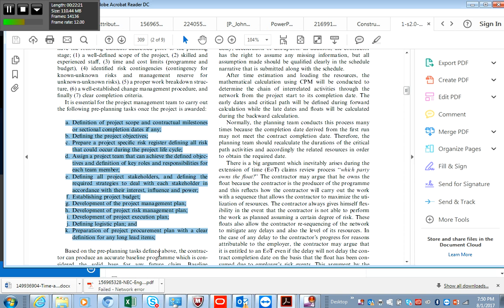After manufacture and you do an inspection test plan, is that not a quality prevention check? If you put an inspection test plan or a quality assurance check where design coordinators have to sign off on a specific drawing, the coordinator looks at it and passes it over to the design manager, he then signs it off and sends it to the client representative, who signs it off again and approves the design for construction, right?